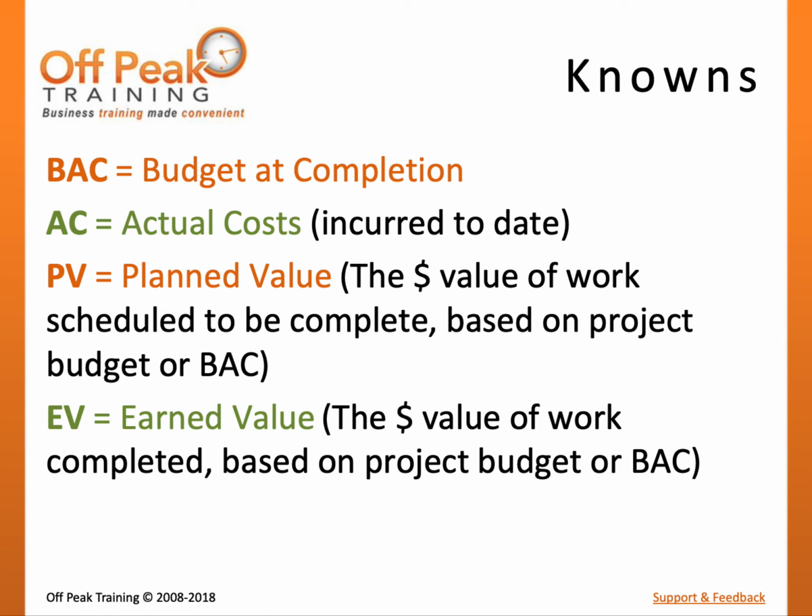At any given time during project execution, there is a series of information that should be known by the project management team. First, the project management team should know the estimated total cost of the project. Typically, this will be agreed upon by key project stakeholders and approved into a cost baseline. In earned value, we will call this budget at completion and abbreviate it as BAC.